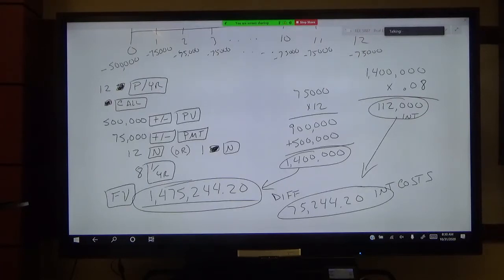But the problem is they have gotten extreme with what they're calling change orders, but in reality they're not really change orders. They're simply, here's how I want you to do the job, in terms of the approach to the job, not so much I'm wanting you to do something differently, or in addition to what you've been contracted to do.